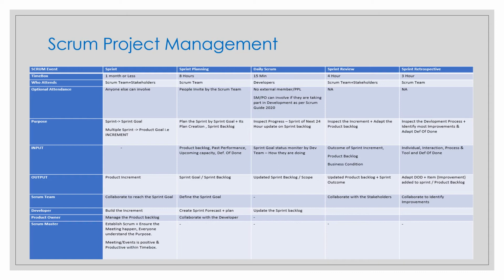They use the definition of done to identify the work, and they keep in mind that they need to create at least one working increment at the end of the sprint. Your sprint backlog will also never be completed. They will pull the PBIs, their plan. The Scrum team will decide the sprint goal, and they will keep updating the sprint backlog based on the daily Scrum.